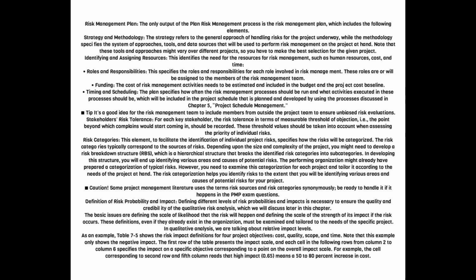The performing organization might already have prepared a categorization of typical risks. However, you need to examine this categorization for each project and tailor it according to the needs of the project at hand. The risk categorization helps you identify risks to the extent that you will be identifying various areas and causes of potential risks for your project. Caution: some project management literature uses the terms risk sources and risk categories synonymously. Be ready to handle it if it happens in the PMP exam questions.